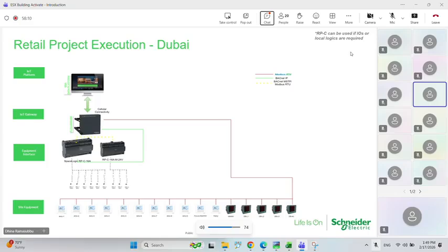Today, they are talking about more use cases like indoor air quality management and people counting. But this is how the journey usually begins. We identify a site, we do a site survey, and we create an architecture which is simple and replicable. That is the way we can enter brownfield sites. If it's a complicated architecture with a lot of IO points and modifications at site, it becomes difficult to scale. Pilot is still doable, but scaling would be difficult.